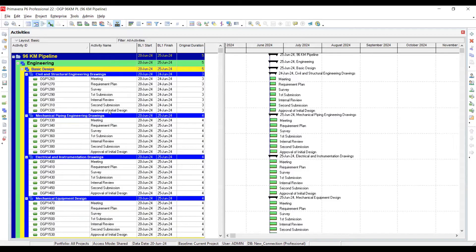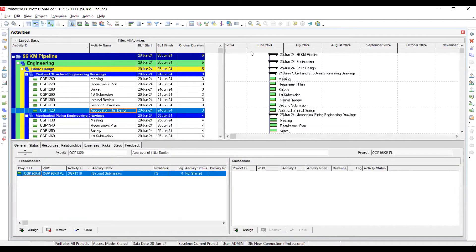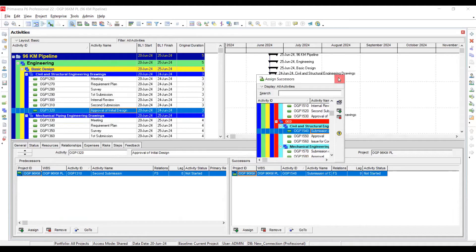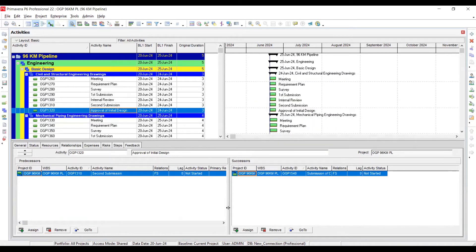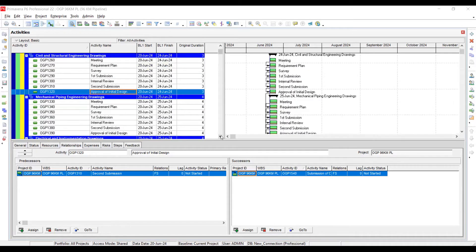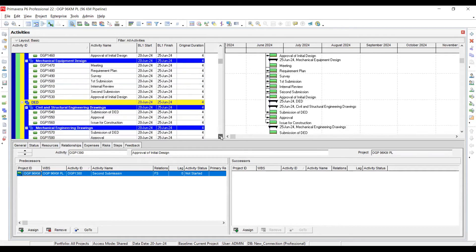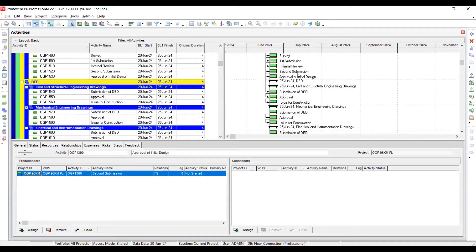This is the interlinking of work packages. I will right-click, go to Activity Details, and here this activity is going to have a successor. Click Assign, and here we select detail engineering design — finish-to-start. That's how it will be done. In the same way, mechanical engineering design will be interlinked with the detail engineering design activity.